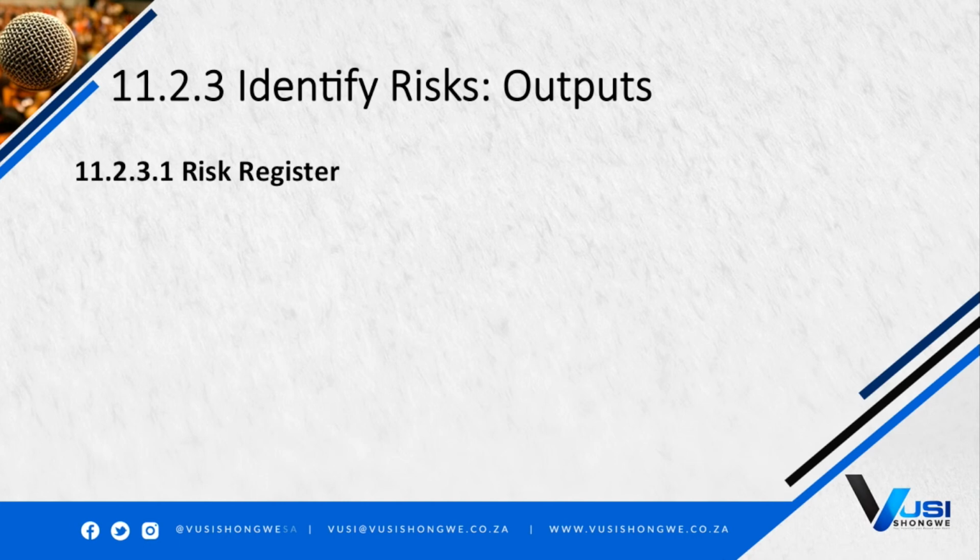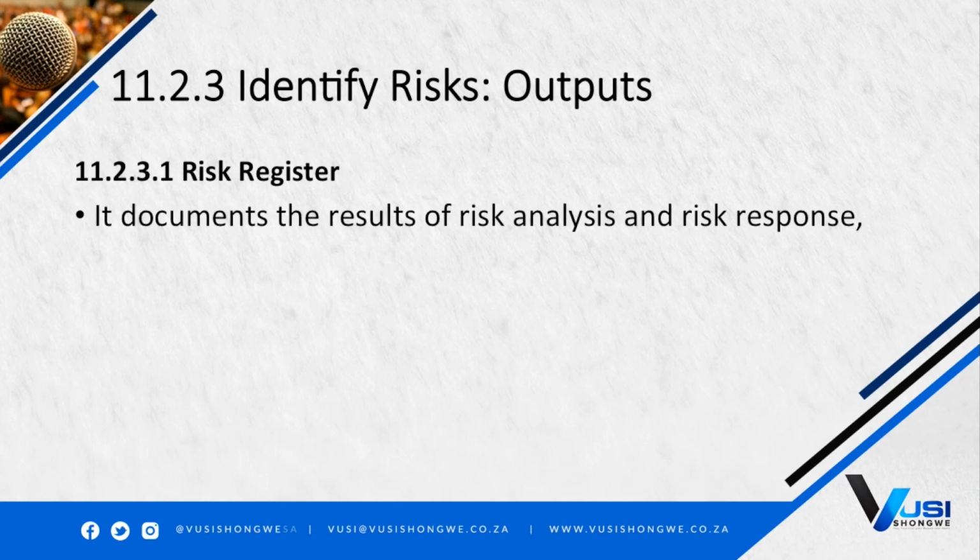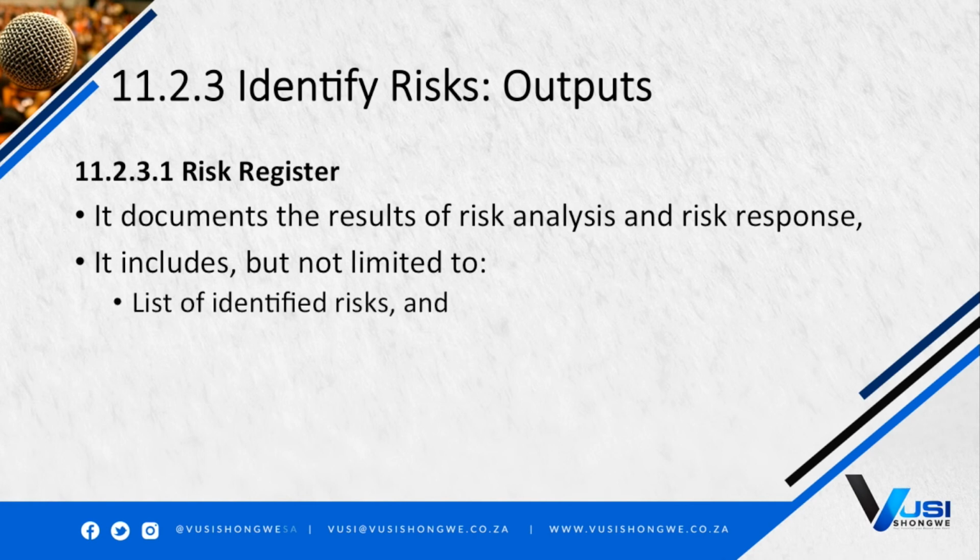And the output is a risk register. It documents the results of risk analysis and risk response. It includes, but is not limited to, a list of identified risks and a list of potential responses.